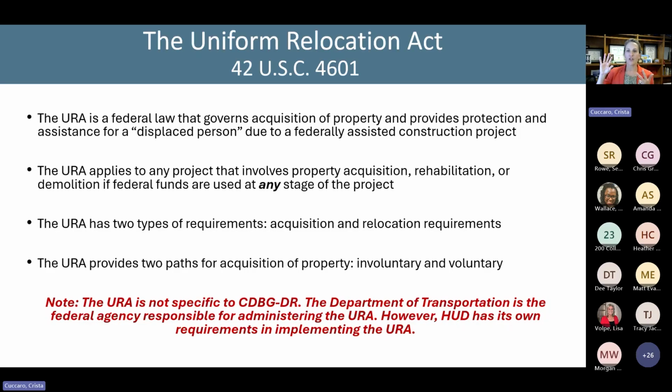If a project involves demolition and then that project will also involve federal funds down the road, the URA applies. All right. What that means is you really have to plan and think through how these projects are going to happen to know whether you need to follow the URA or not.